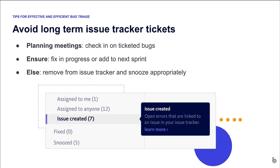Because it's so important to avoid long-term issue tracker tickets, we recommend incorporating BugSnag into your planning meetings. If you work in sprints, as part of your sprint planning process, open up BugSnag as a team and filter down to bugs that have issues created. Make sure every bug matching these criteria is either currently being worked on or will be worked on very shortly. If any issues don't meet that criteria — if something is dragging and unlikely to be worked on soon — remove it from the issue tracker, snooze it appropriately in BugSnag, with the peace of mind that it will return to 'for review' if it ever becomes impactful enough.